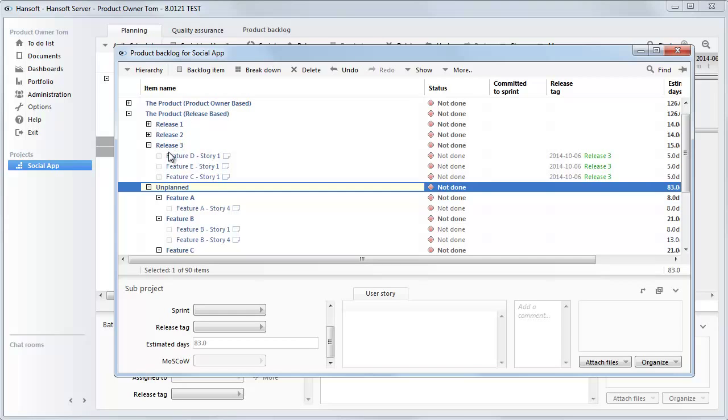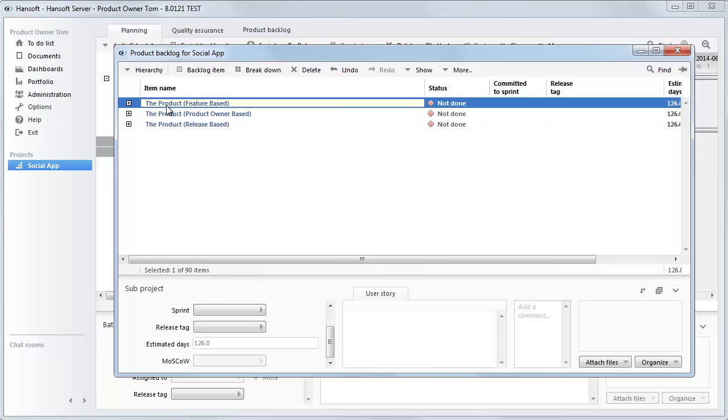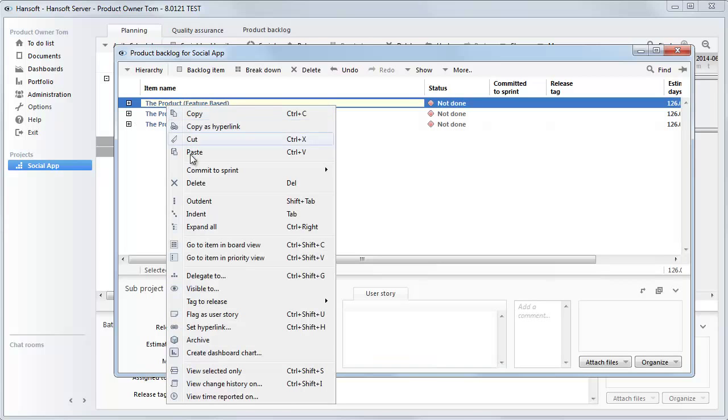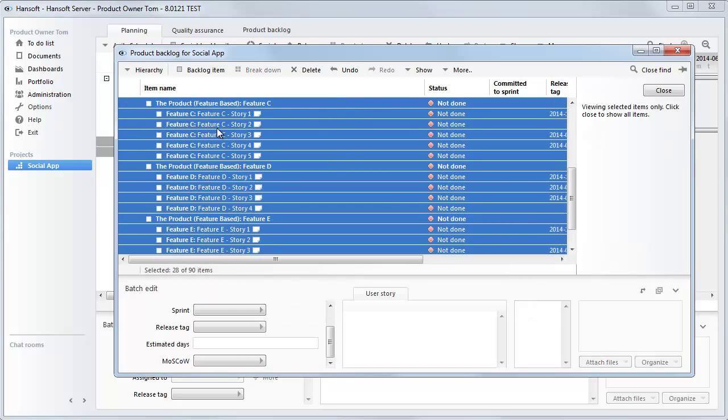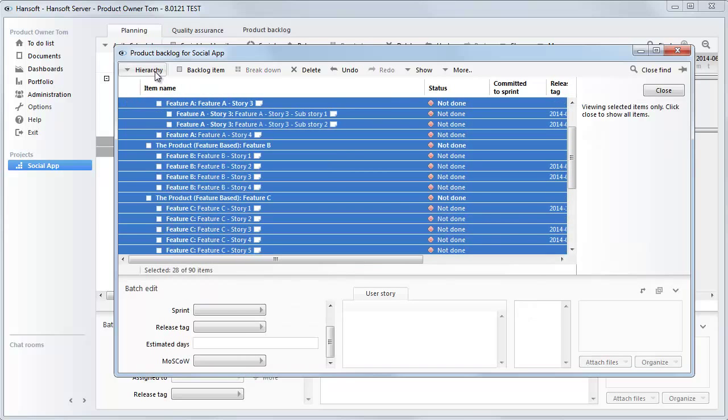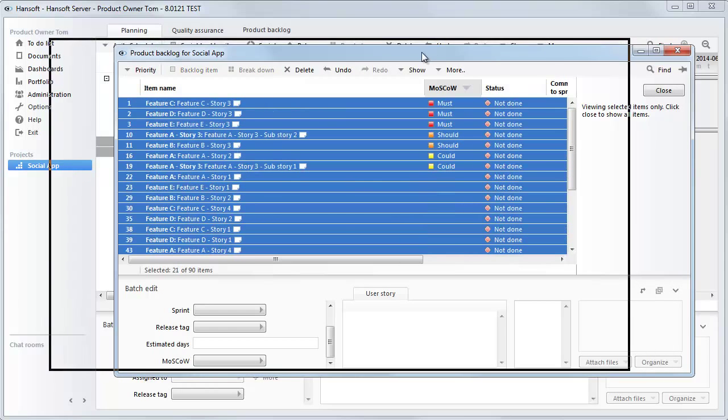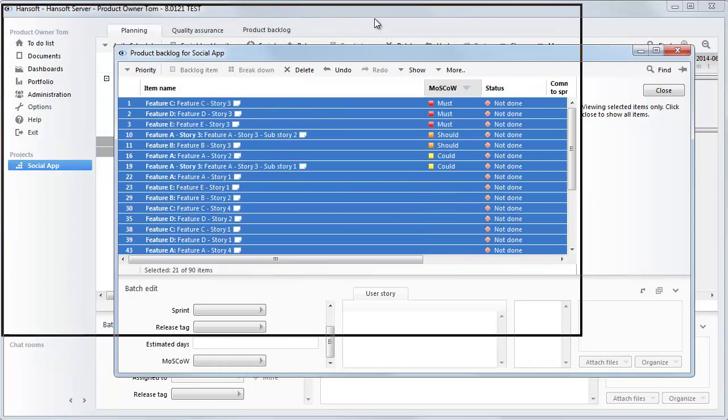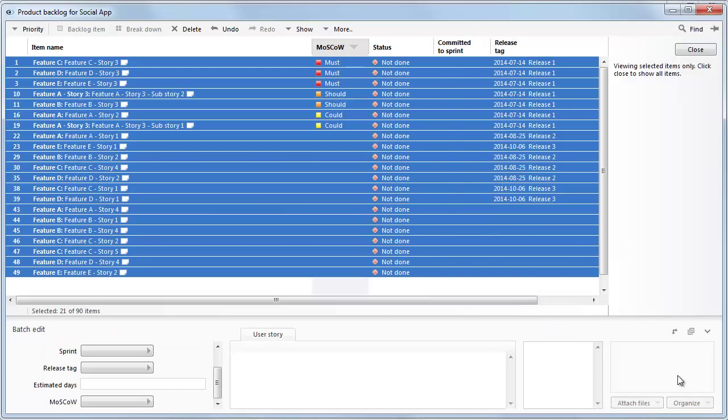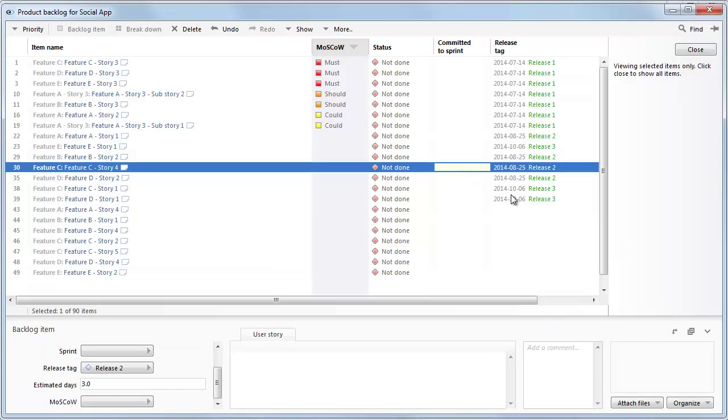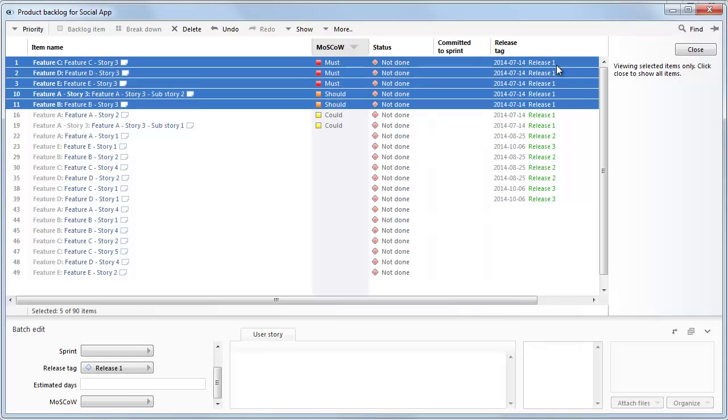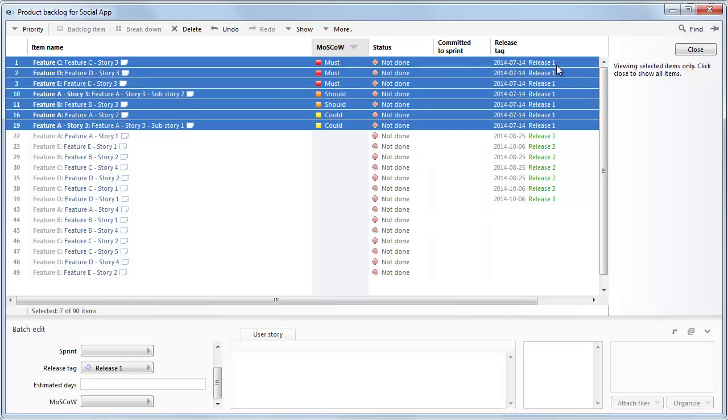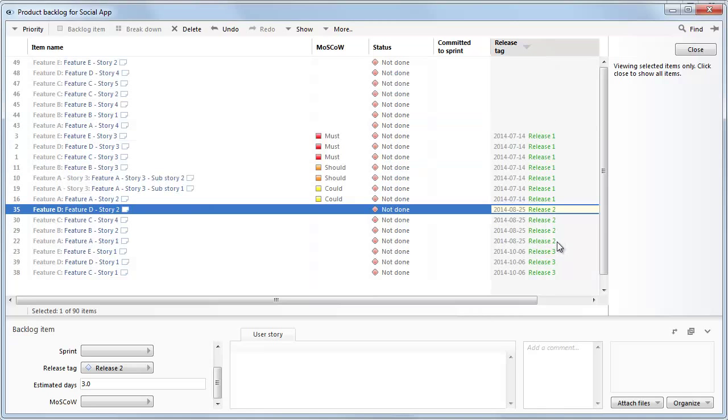So the second advice I'm going to give you is to use release tagging as the first level of prioritization. And for that, I'm just going to use the feature-based backlog. So I'm going to click View Selected Only here to just carve out that portion of the backlog and go into Priority. So in here, we can see two things that I've done. First, you can see that I've tagged features to the different releases. So we can see here, these items are tagged to release one. I'm going to sort by release here. And these items are tagged to release two. And these are release three.